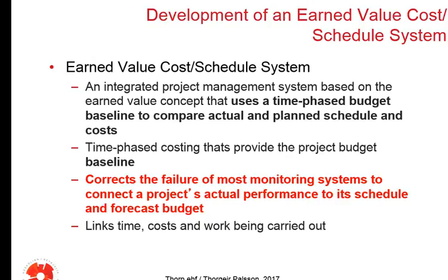The time-phased budget baseline is the one that you can get when you have put in the time and the money per time unit and accumulated at the bottom, you remember, and that is when you get the final sum of the project, and that is what we call a baseline. You have to use that in the earned value system, compare with actual and planned cost, so that you can get the information that you need. Time-phased costing that provides the project budget baseline. That is what we need.